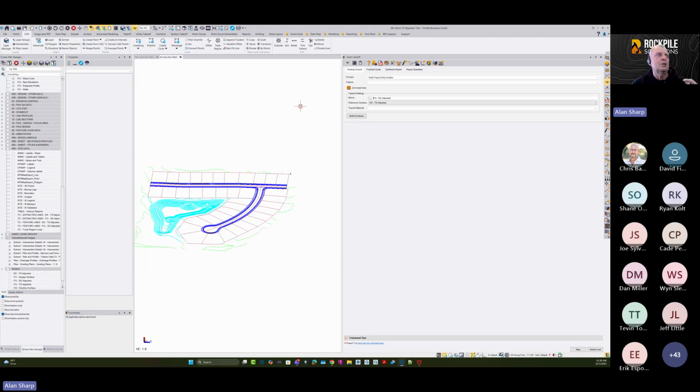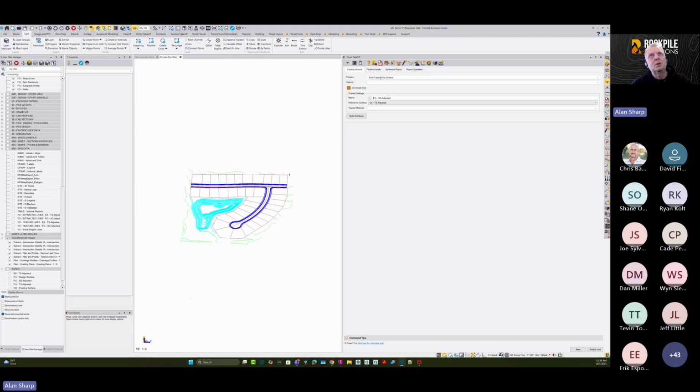So in here, and we're still, I had a meeting this morning with Ann, the developer who's working on this, and we're going to make one more modification to the way we're calculating these. We really don't see the difference between a topsoil stripping and a demolition on existing. They're basically subgrade adjustments to existing. So why treat them as different? We know the topsoil is in the topsoil strip, and that's all we need to know. Because when we do a topsoil balance, we know there's strip and we know there's replacement, and we can do the balance between the two and generate a report just purely on the material. We don't need to treat them separately.